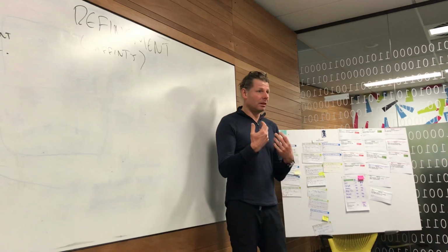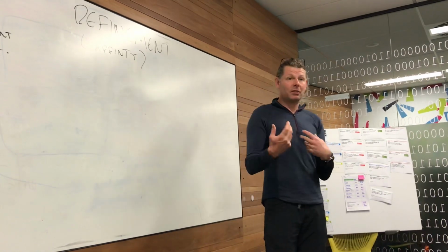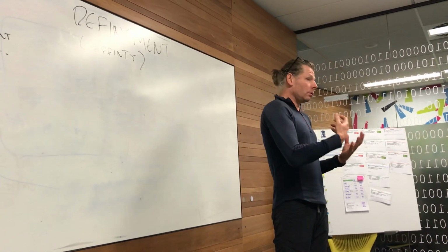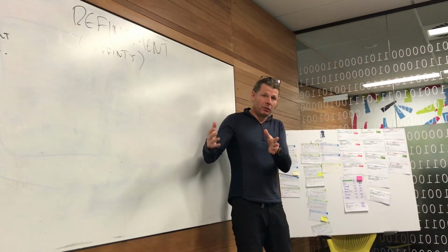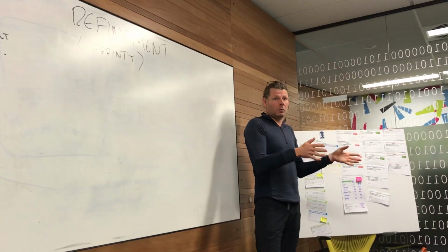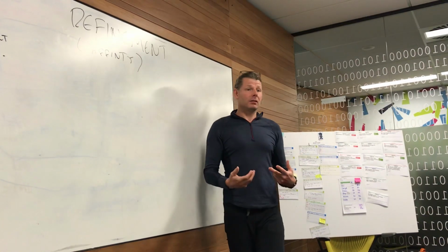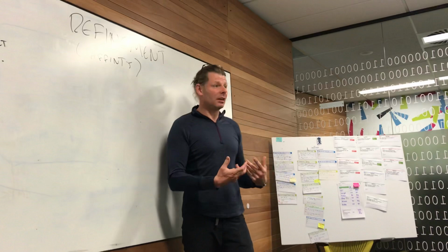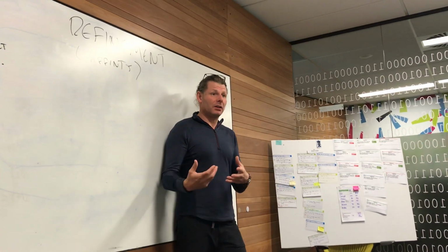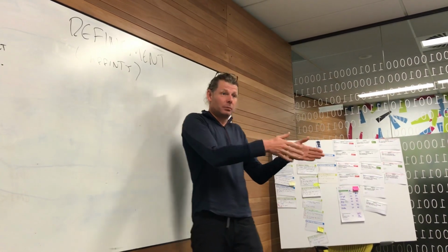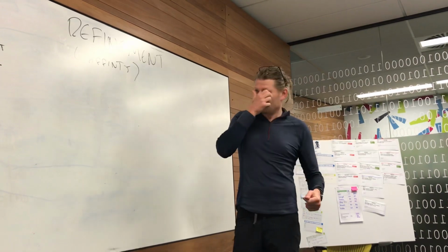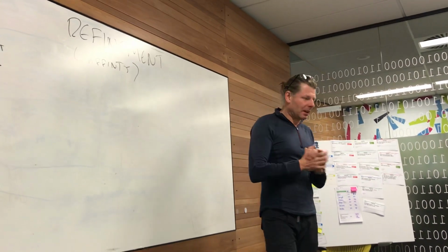And it's always a context-specific thing, so every team is different, and you need to know what's suitable for you to do as little as possible, but enough such that you can do the work without stalling or delaying during the sprint. So that's what refinement is, and the Scrum Guide suggests no more than 10% of your time in a sprint on future sprints, not just the next sprint, but future sprints, all of them. So that's refinement. Affinity estimating.